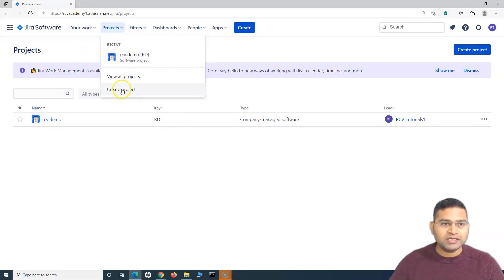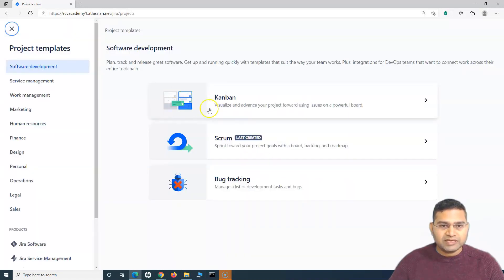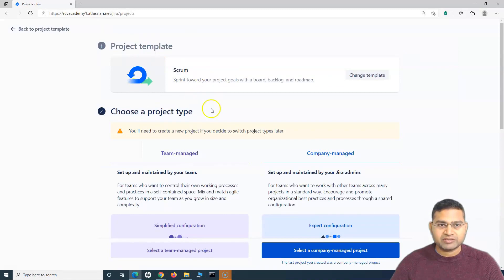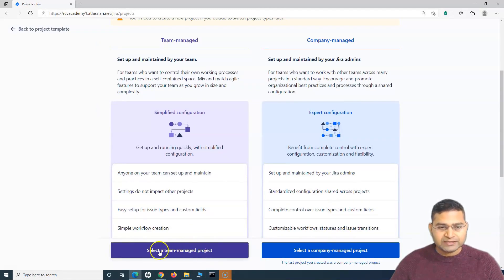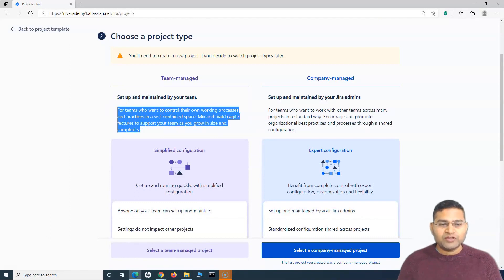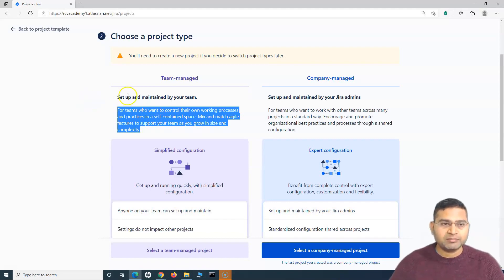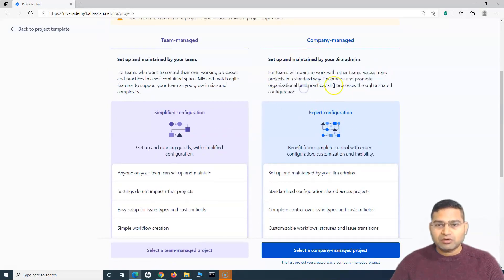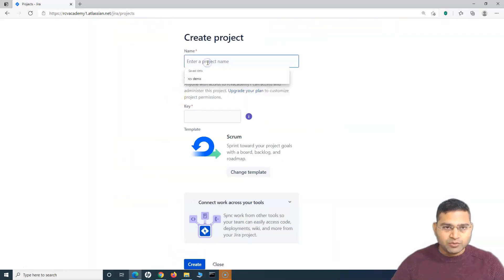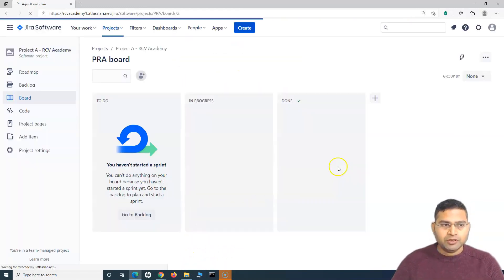Let me open Jira Software. The first thing is to create a project, so I'll click on 'Create project' and select a Scrum project, since we are doing software development using Scrum. I'll use this Scrum template. You can select team-managed or company-managed. With team-managed, you can configure the workflow yourself within your team without impacting other configurations in the organization. So I'll select team-managed, give it the name 'Project A RCV Academy', and click on 'Create'. Step one is done.